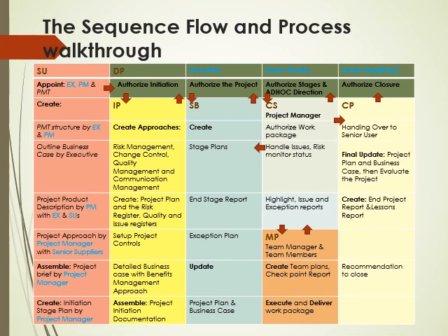Once these two documents are assembled, the project brief and the initiation stage plan will be passed to the project board. Now, the project board consists of the three representatives of the stakeholder interests, which is the business, the users, and the suppliers. The executive represents the business interest, the senior users represent the user interest, the senior supplier represents the supplier interest. Remember, there's only one executive, okay?